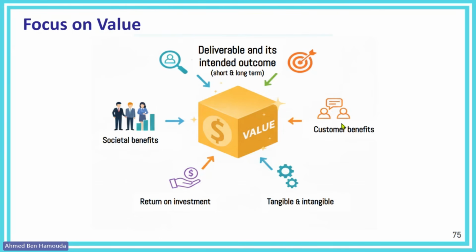Here, value actually can be measured per unit of investment, and can be realized throughout the project, preferably throughout the project, because in the traditional waterfall, value was so far realized only at the end of the project. However, in the new mindset, it's more preferred that value is realized throughout the project, especially if you are following a hybrid approach or an adaptive approach.